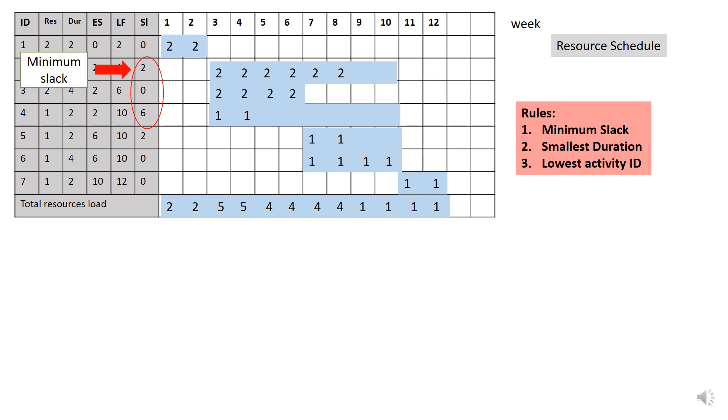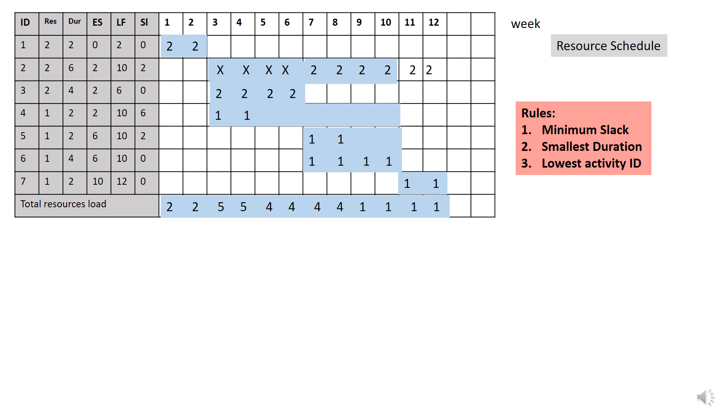The next activity with minimum slack is activity 2. It has slack of 2. So you need to delay activity 2 until the resources is not more than 3. In this case, you need to shift activity 2 until week 6. So that week 3, 4 and 5 has total number of resources of 3. And week 5 and 6 has 2 numbers of resources. So with the 6 weeks of duration, activity 2 completes at week 12.